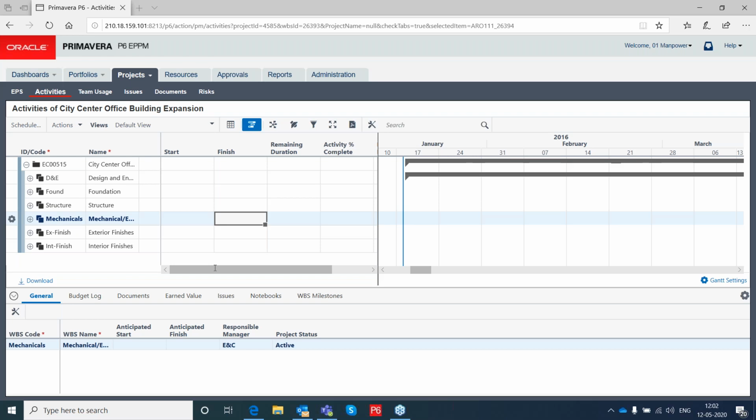If the payment terms is both advance at start and finish at last, so which actual type will we select? Srinivasan, that's a question for you. We can't have two accrual types. So it can be either at the start of the activity or end of the activity. Somewhere you will have to mark that.